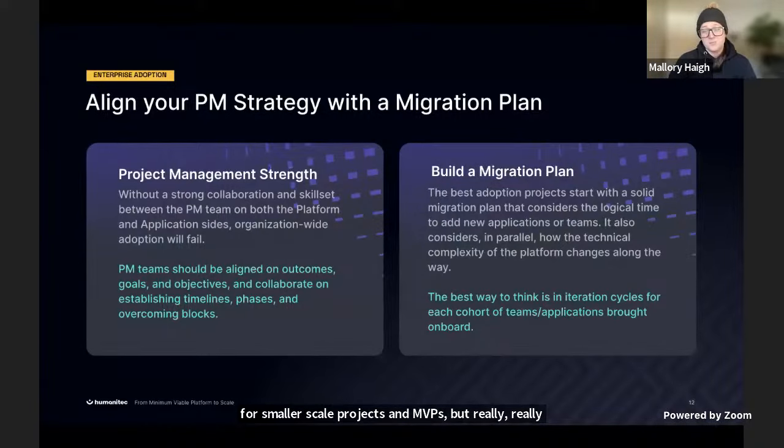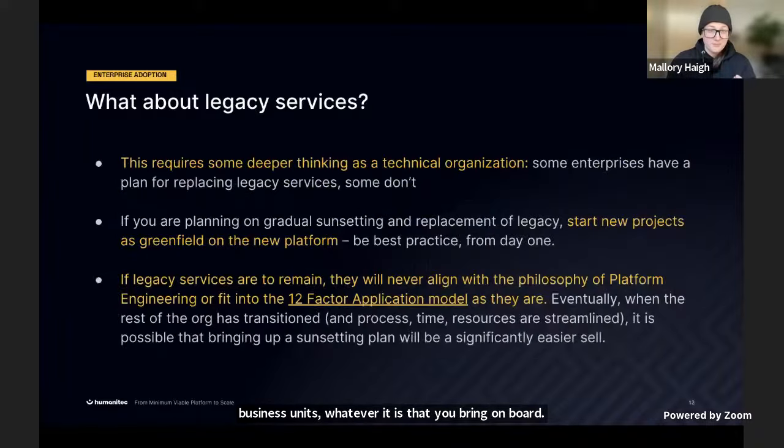The other thing that's important is building migration plans. So the best projects that we see are ones that start with a solid plan to begin with. They consider what logical time is going to be required to bring on new applications or whole teams. It considers how the technical complexity of the platform has to change in parallel with that onboarding. Having that from the very start or very early on, at least some form of it, is really important. So the best way I like to think about it is in iteration cycles for each cohort or group of teams or applications or business units, whatever it is that you bring on board. So think about it cyclically.